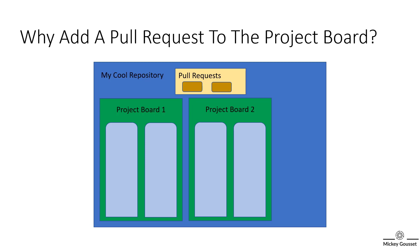By taking a pull request and adding it to a project board, you have the ability to track and prioritize the pull requests to work on. Pull requests by themselves don't have any sort of priority or order to them. Adding them to a project board allows you to wrap some process around your pull requests. And the connection between the board and the pull request is bidirectional, so updates to the pull request are reflected on the board and vice versa.